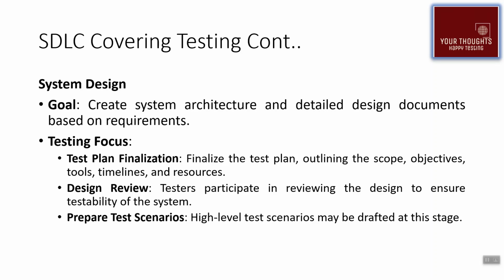So you can craft your tentative estimate at the high level. And once we have time to work, make a work breakdown structure at the low level design, then we will be able to craft and map our estimates well. Because in the low level design, we have a very clear picture from the dev side as well, of how much time they need.